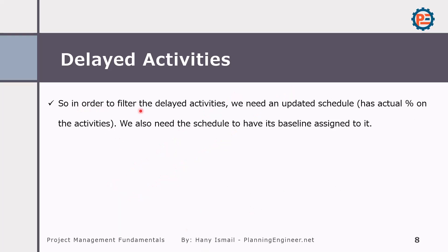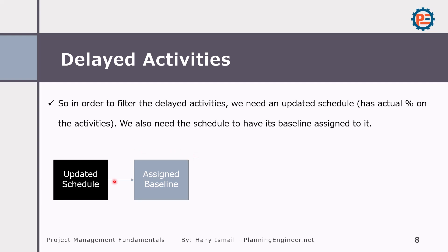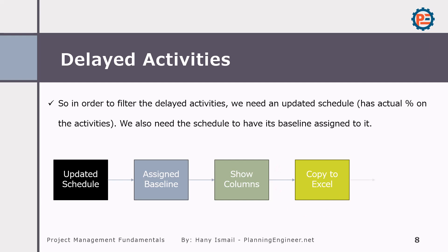In order to filter the delayed activities, we need to update our schedule with actuals, then we can do the steps. We have an updated schedule, we assign a baseline to it, then we show the columns of delays which we are going to copy later into Excel. Then we copy to Excel and apply some filters. Very simple — don't worry. Even if you don't know anything in Primavera, you can still do these steps.